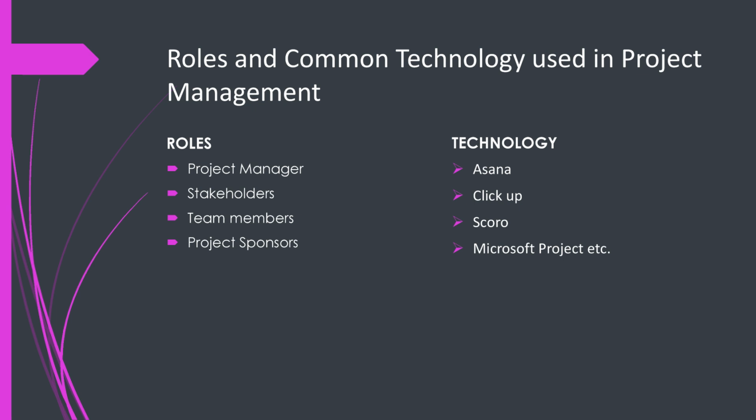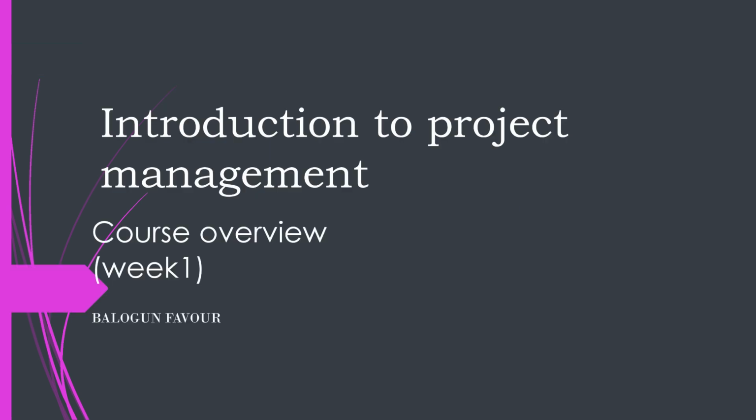Now, as a project manager, what you should do is use a realistic timeline and monitor your progress. You know that, okay, fine, it will take me 3 weeks. I'm a kind of person that if it will take me 3 weeks to do something, I would even tell you 3 weeks and 4 days, so that I have an excess day remaining, because I'm a lazy person and I procrastinate a lot. So if as a project manager you know it will take you 3 weeks, you can tell your clients or the stakeholders 3 weeks and 4 days. Then if you deliver in 3 weeks, you seem even more effective. You seem like you are doing it ahead of the projected time, and it makes you look better than having to miss a deadline and putting everybody at stake. By anticipating challenges and adapting quickly, we can easily keep the project on track.